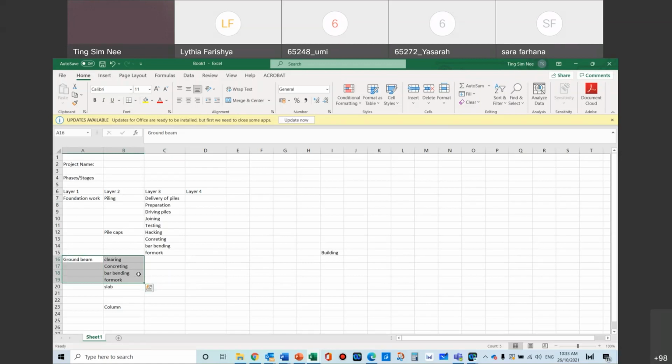Okay. So sometimes you've got building 1, 2, 3. We really don't want to have building 1 and then repetition in building 2, the same repetition, and then you go to 5 layers, you end up with 5 layers. So like I said, maximum 4 layers, okay? Depending on whether it can be completely covered within those 4 layers. Otherwise, you need to make adjustments, okay?